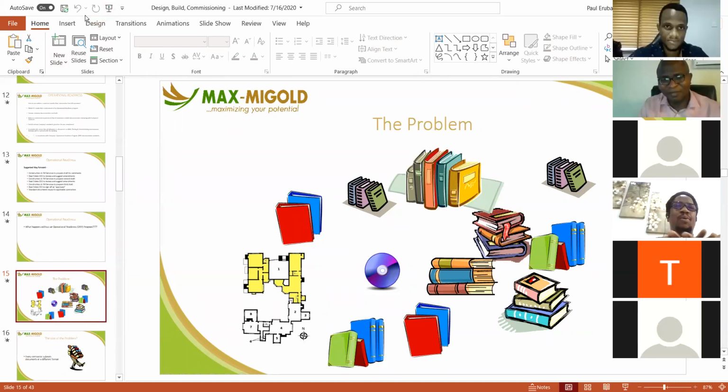They're supposed to submit progress reports with their invoice at different milestones. They became so used to the client not opening those CDs before processing their invoice, because the contract said you must submit an update. Like if you want to do a variation change, you submit a CD of the change and you do all those simulations, and that's the expectation. They know the client will not open it. They've discussed it, and know the client will just process their invoice. So they kept submitting blank CDs with their paperwork.